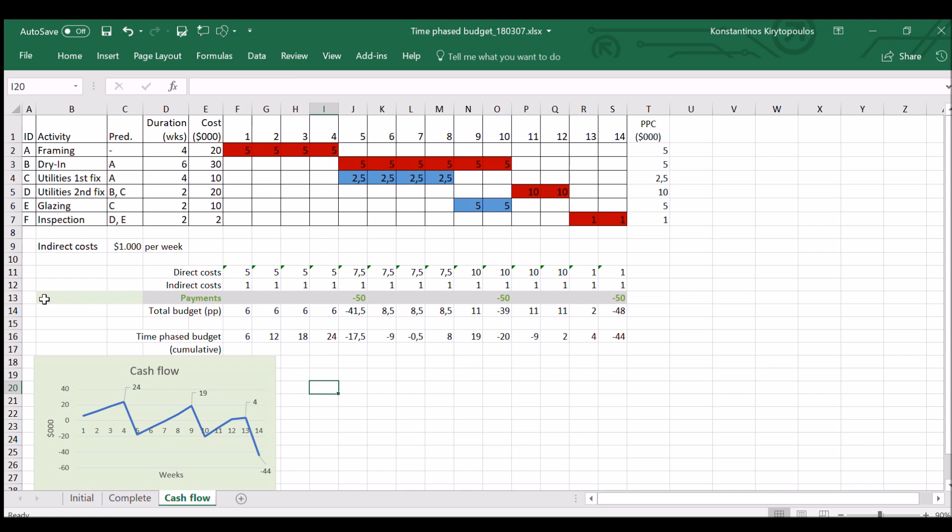So there are three payments of $50,000 at weeks 5, 10, and 14. And as you can see now, the curve is not an S-curve anymore. So what is happening is that I have some peaks. And these peaks will tell me the amount of money that I need to invest myself before I get paid from the customer.